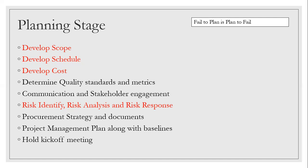Communication planning: what kind of reports are you going to roll out? A weekly status report, a monthly VP-level report, or multiple reports for different stakeholder segments? How do you engage with stakeholders — on-site face-to-face, video call, phone? In service companies, project managers also travel a lot because travel is part of the budget paid by the client, for checking data center status or meeting key stakeholders and project sponsors.